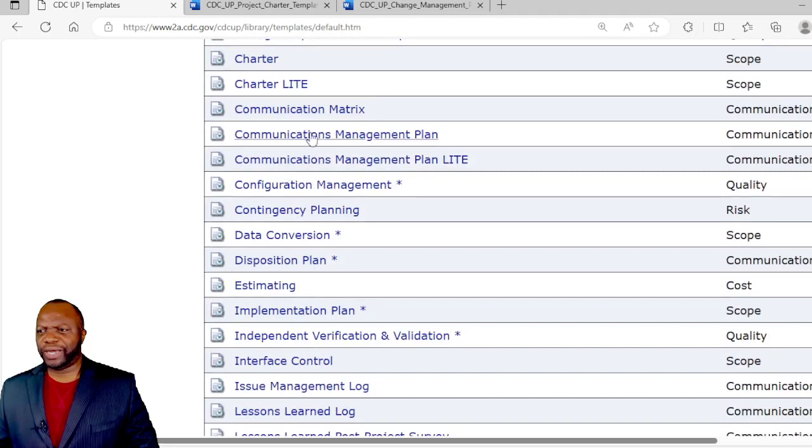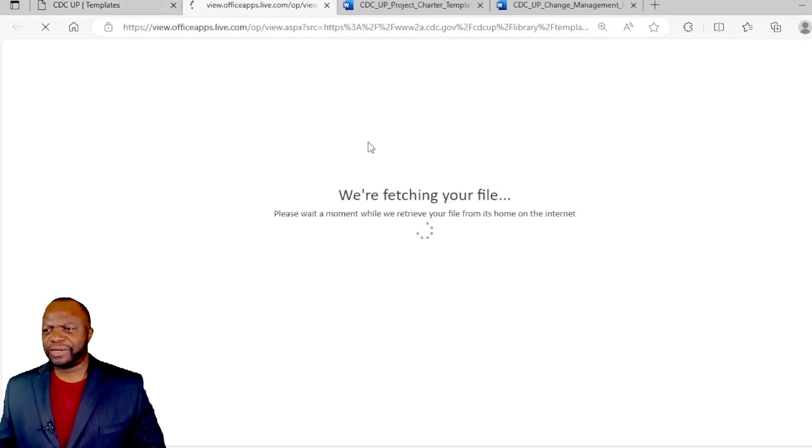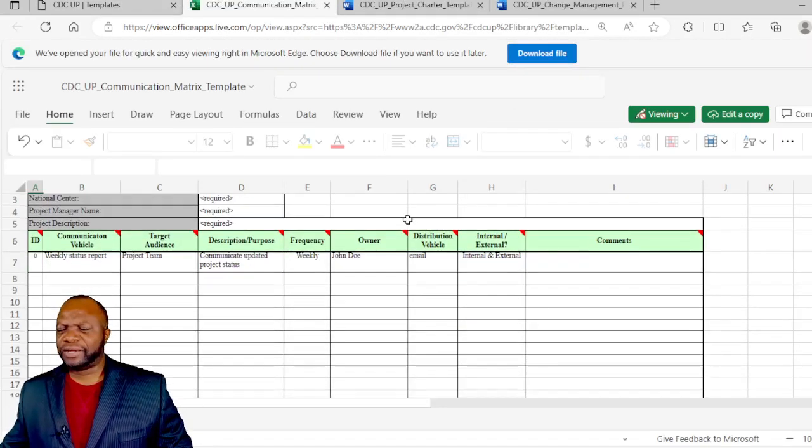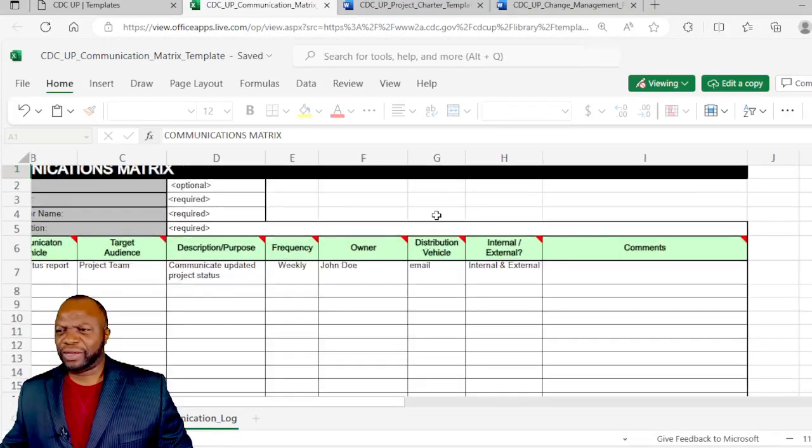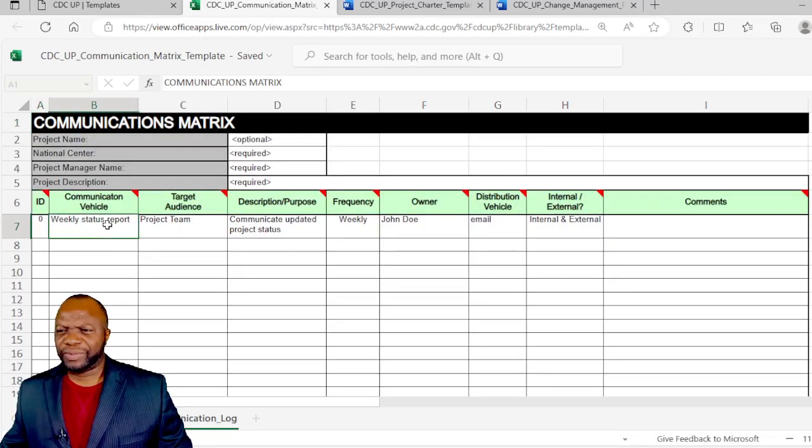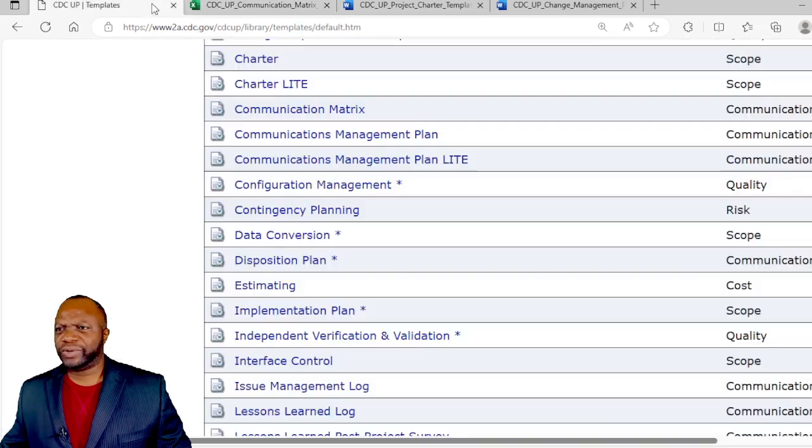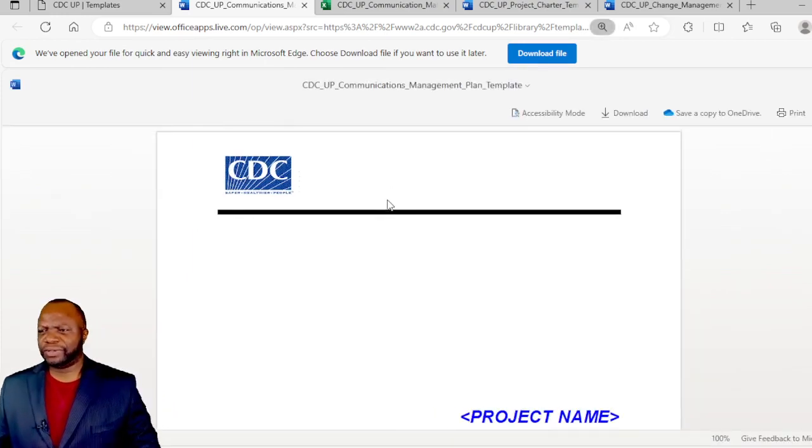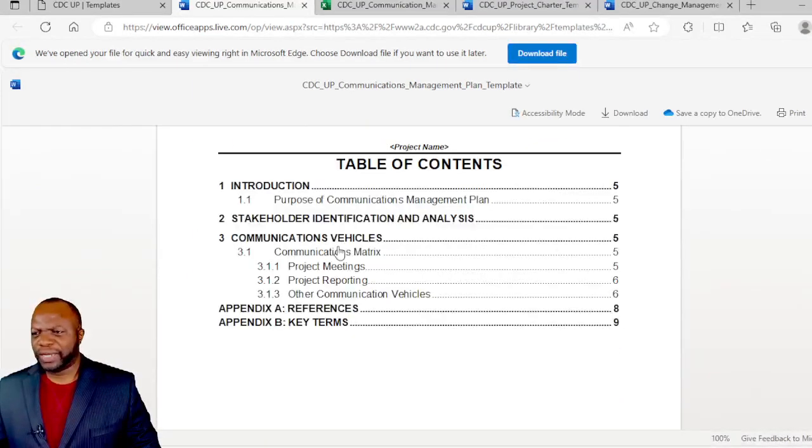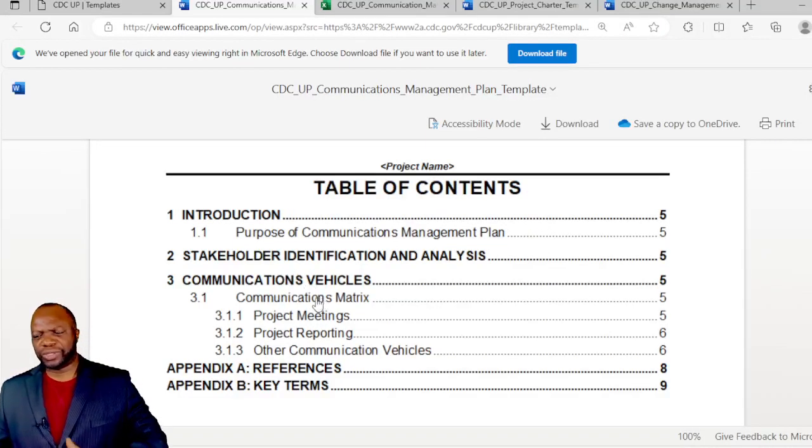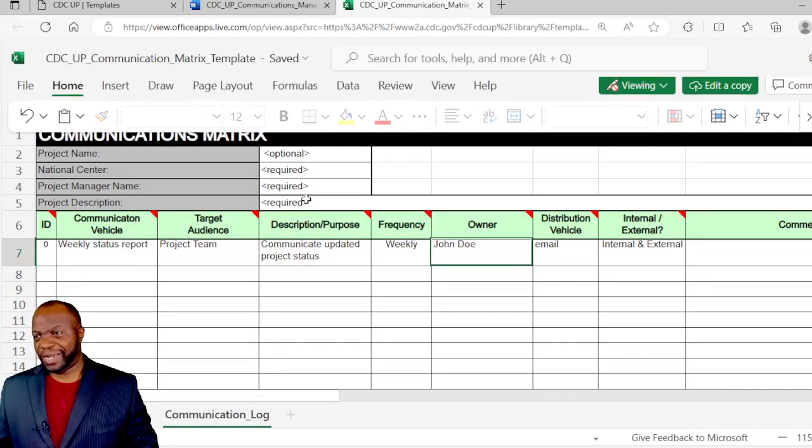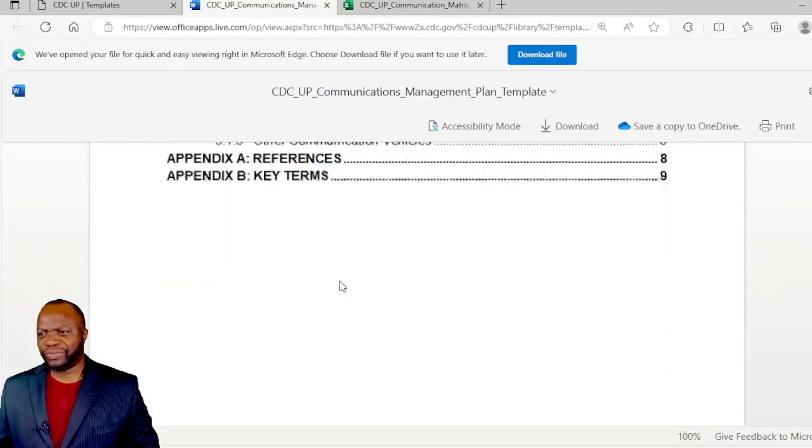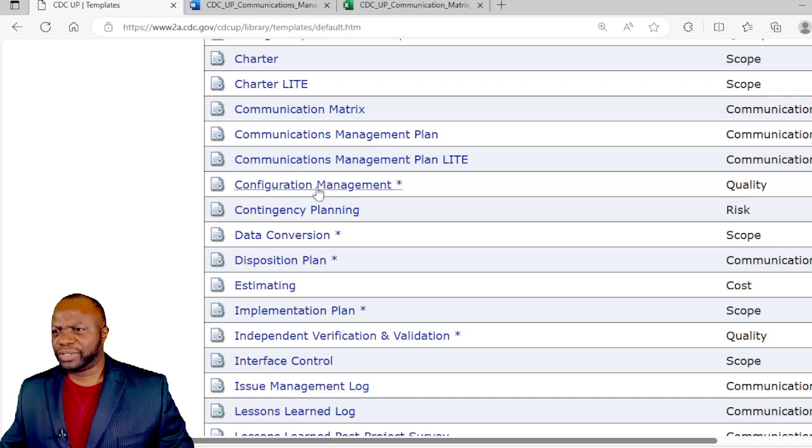Then we get into a communications management plan, communications management plan light. There's a communication matrix. Let's click on that and see what the CDC have done with that. This matrix is like a communications strategy of sorts where we have the communication vehicle and the target audience, the frequency of communication, the owner. If you go to the communications management plan, this is more textual in Word and talks about the stakeholder vehicles on a broader scale, but this narrows it down. Some projects you may only need this one, other more robust projects you may choose to have this as a blanket plan across the board.